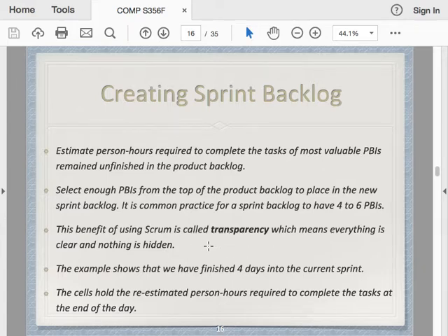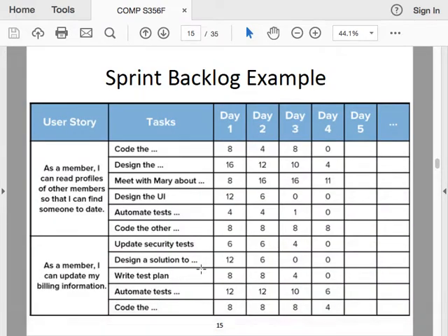And one benefit of using Scrum is you know the progress of the project anytime. For example, each task clearly states the remaining work to be done. So each day, the responsible person doing this task would give an update of the remaining work.